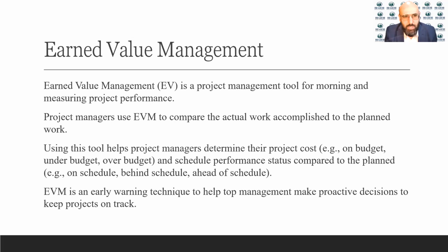The first technique is called the earned value. Earned value management is a project management tool for monitoring and measuring project performance. Project managers use earned value management to compare the actual work accomplished to the planned work. So again, monitoring is based on actual versus planned. Using this tool will help you to determine the project cost, whether it's on budget, under budget, or over budget. It will also help you find out the schedule performance status, such as if the project is on schedule, behind schedule, or ahead of schedule.